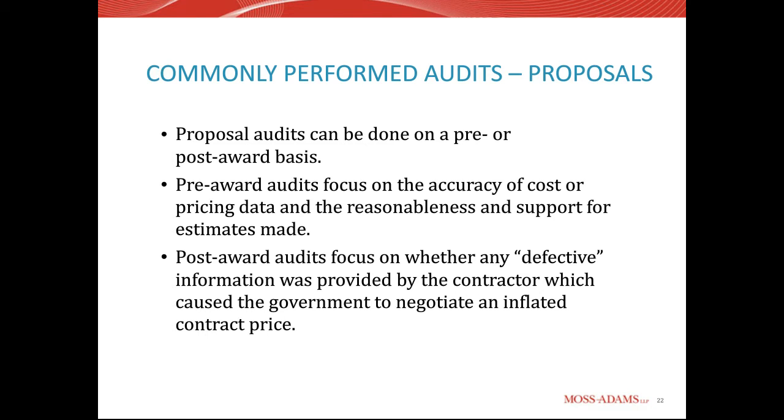So with pre-award audits, the focus is on the accuracy of cost or pricing data and the reasonableness and support for the estimates made. As Curtis mentioned, I'm going to get to the post-award in a second, but that will then assist negotiation of a fair and reasonable price on that pre-award audit. Now, on the post-award audits, as Curtis mentioned, they often have to sign a certificate of current cost or pricing data. This is an important document.